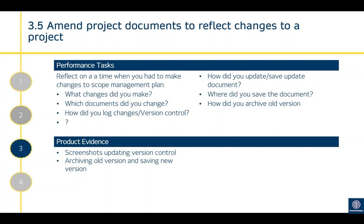Criterion 3.5 is to amend documents to reflect changes — changes have been approved, communicated out, and documents are now updated. In most holistic statements, 3.4 and 3.5 would be switched around — you'd probably update documents before communicating out to stakeholders. For 3.5, you want evidence that you've actually updated project documents: the schedule plan, resource plan, finance plan, version control updated, saved in the right place or on the correct software. Reflect on what changes you made, what documents you changed, how you logged version control, how you saved and archived the old version — just a bit of detail about how you actually did that. Product evidence would be screenshots of version control, archiving an old version, or saving a new version — for example in SharePoint marking it as archived and putting the new version there.